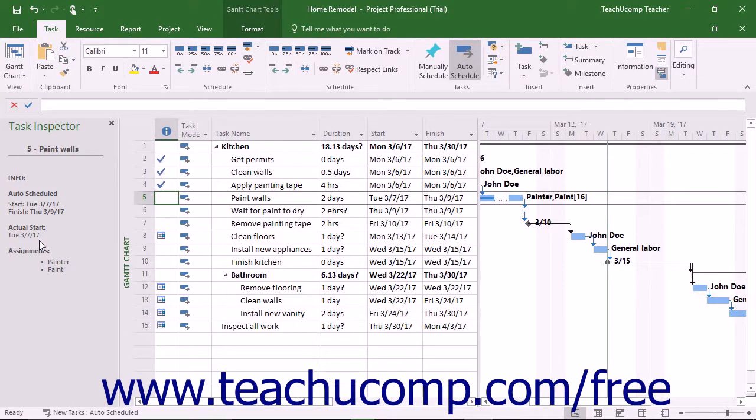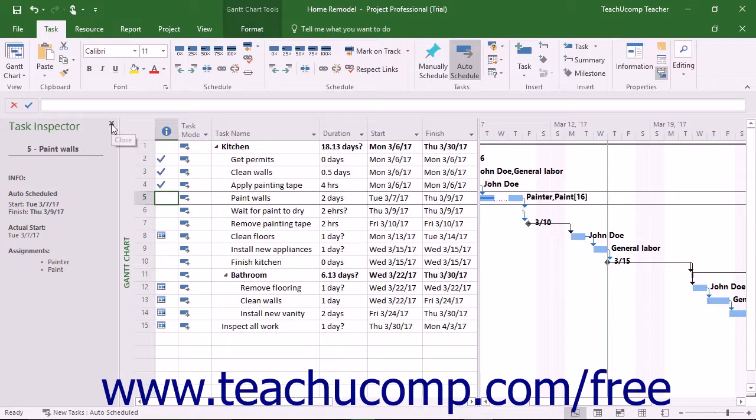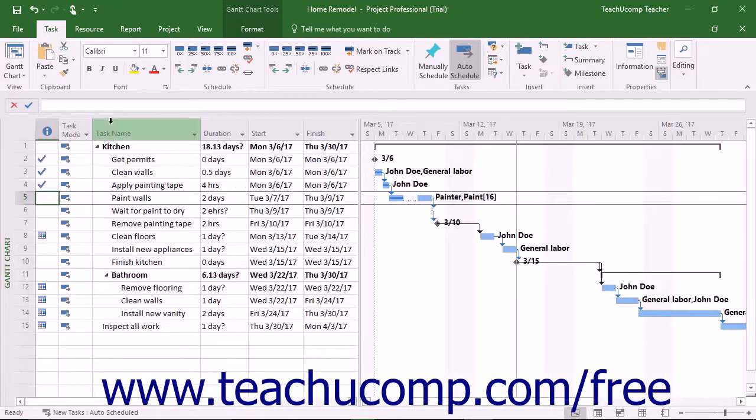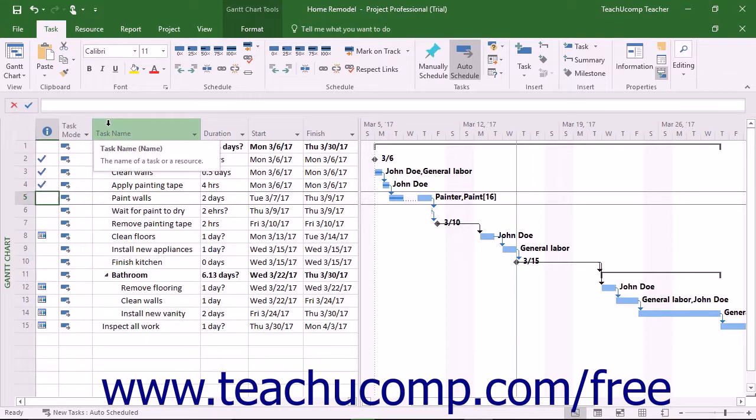To turn off the pane when you are finished inspecting the task information, click the X in the upper right corner of the Task Inspector task pane, or click the Inspect button within the Tasks button group on the Task tab in the ribbon.